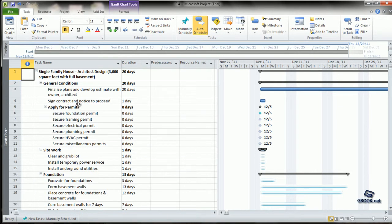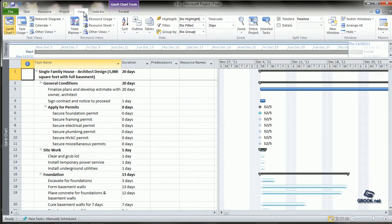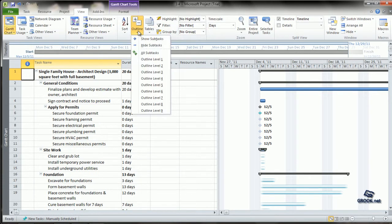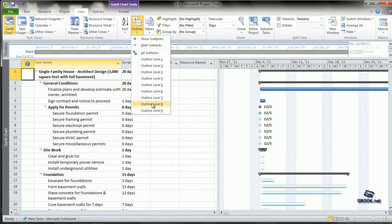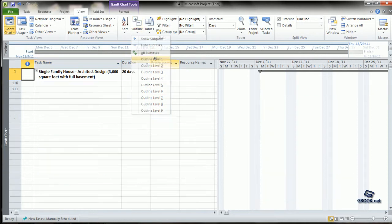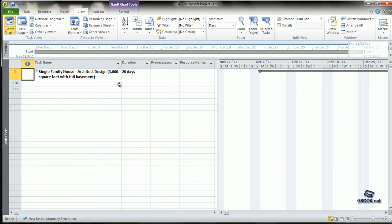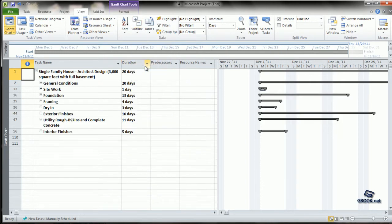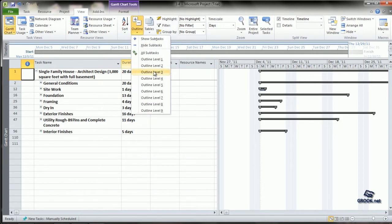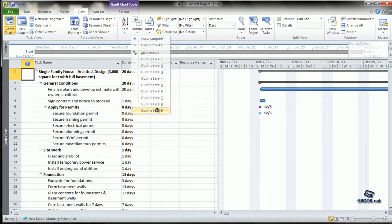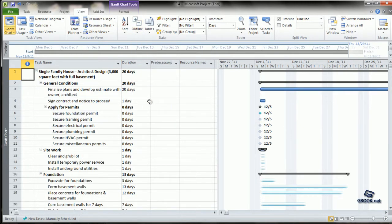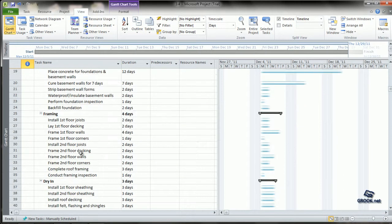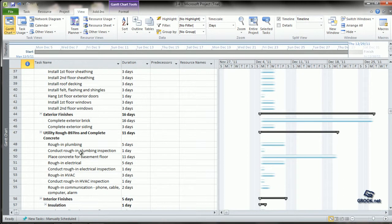To check the outline view, we can go to the view tab, click outline. It shows subtasks starting from outline level 1 to outline level 9. If we click outline level 1, we see that only the major heading is shown. If we click outline level 2, next set of subheadings are shown and so on. Clicking outline level 9, all the tasks will become visible.